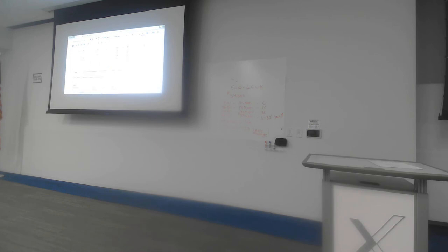Now I'm going to move back up and pick out my next best activity that I can crash. Activity C is now maxed out, so I'm going to put an asterisk beside that. And so A, C, E, I, and J were the activities that were on the critical path. So the next cheapest item on that is activity E, at a cost of €5 a day. And this time I've got a little bit more to play with here. I can crash it by 4 days in total. So I'm going to do that.